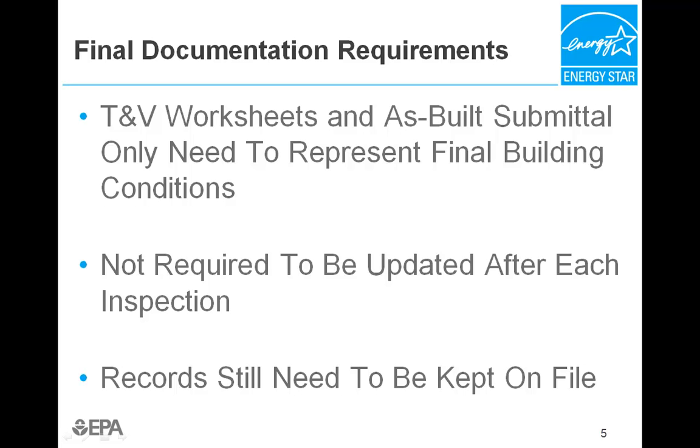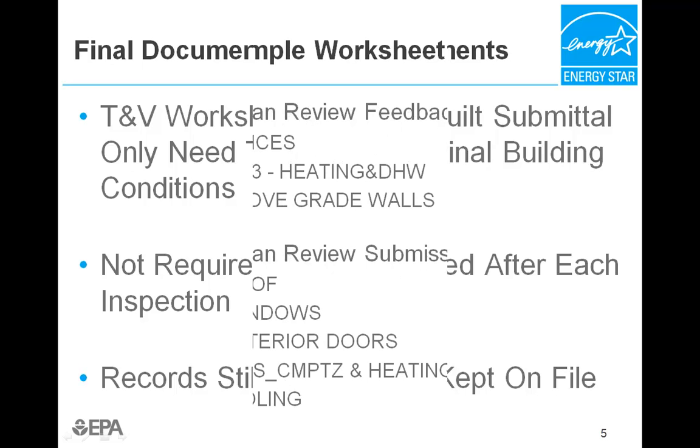At a minimum, the TNV worksheets filled in by hand at each inspection shall be kept on file in case further information is requested by EPA.